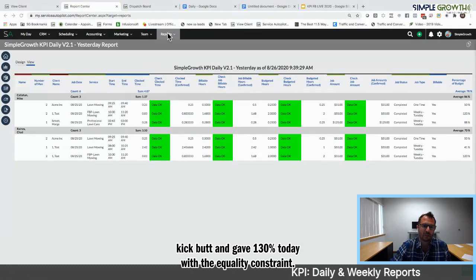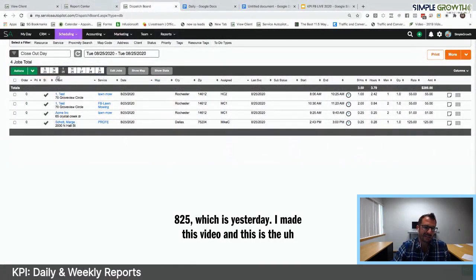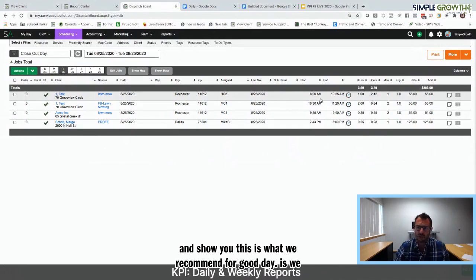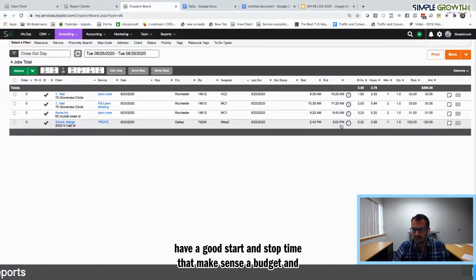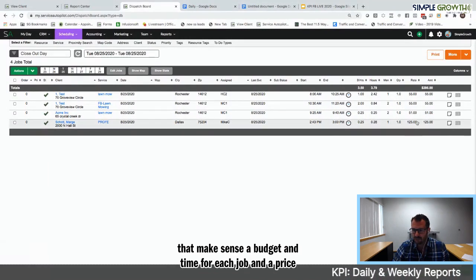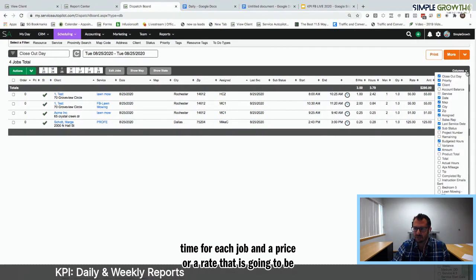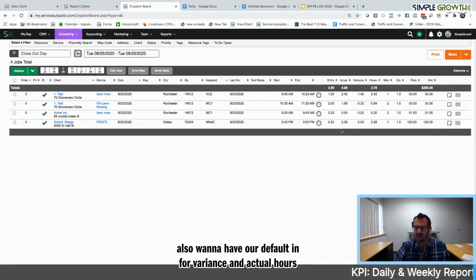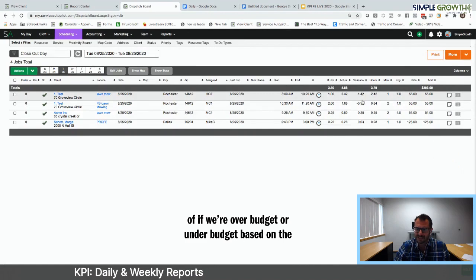So I'm going to go in here on 8/25, which was yesterday when I made this video. And this is the closeout day screen in Service Autopilot. I'm going to go in here and show you this is what we recommend for good data: we want to go in and make sure we have a good start and stop time that makes sense, a budgeted time for each job, and a price or a rate. That is going to be the things we want. We also want to have our default in for variance and actual hours. So that'll give us some clarity of if we were over budget or under budget based on the variance.